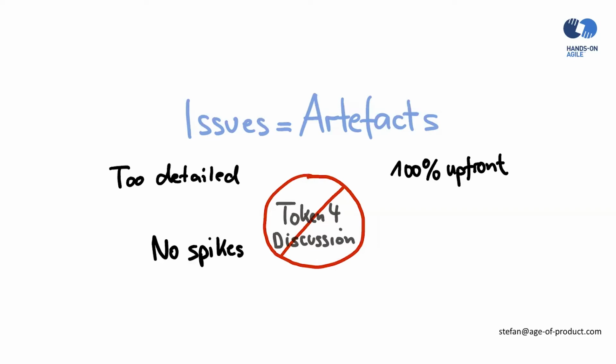So starting a new project with a product backlog that contains hundreds of stories that are all prepared is really not a good idea. The same applies to a backlog that is already completely estimated. Once again, estimation is a critical part of the collaborative creation process of user stories. But it's not about figuring out the future productivity of the team. It's again something that is triggering the discussion among the team members. Is everyone on the same side? Do we have an understanding what we are supposed to build and what the scope is here, right?